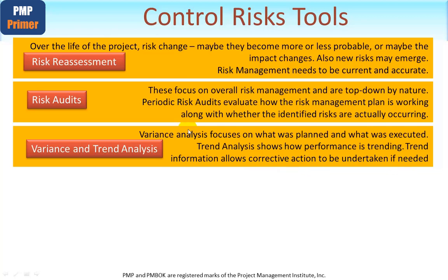Now we are talking here about risks. So with regard to this tool within the control risk process, we'd be looking at trend analysis on risks. In the next and final slide, I'm going to show you how it's quite normal and natural that the total risks on the project are greatest at the beginning because nothing has been done about them. But as you approach the end of the project, risks will be minimised since we've carried out all of the activities, created the products, and there won't be too many remaining. Always some, of course, called residual risk, which we'll look at again in the next slide.